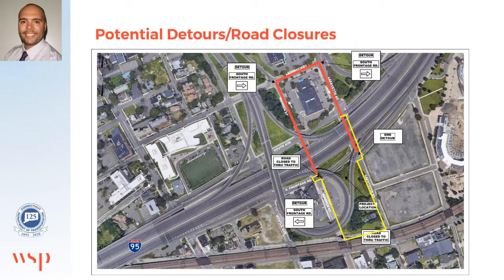In yellow is the pedestrian sidewalk detour, to be implemented as needed. This path was chosen because it has less roadway crossings and would be safer than detouring pedestrians to the north where they would have to cross South Ave. As previously mentioned, detours are not expected to be long-term, more in the magnitude of a few weeks. Depending on schedules, the contractor will have the ability to modify the detours or closures. Regardless, before any detour is implemented, variable message boards will be posted in numerous locations to give the public a heads up on any changes in traffic operations.